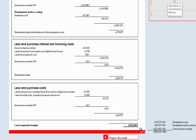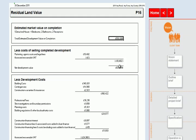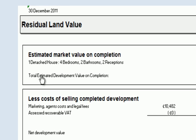This figure gives you an indication of whether or not a project is feasible. If this figure is negative then it wouldn't be feasible and you wouldn't consider the project. But if it's positive then you start to get an idea of how much the land could be worth. As a landowner, this gives you an idea of how much you could achieve for a piece of land that would support this type of property.